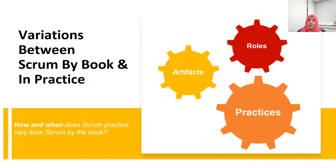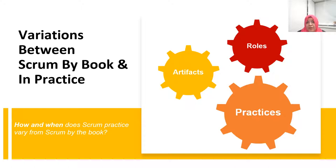While looking at how and when Scrum practice varies from Scrum by the Book, we found variation across three main categories: variations in Scrum roles, variations in Scrum artifacts, and variations in Scrum practices. Some examples of variations in Scrum roles include multiple teams sharing a product owner or a Scrum Master. We also found that teams were practicing Scrum without any Scrum Master, and it was also common that a team member was serving as Scrum Master on a rotational basis. While Scrum by the Book encourages cross-functional teams, our results confirm that it is not uncommon for a team of specialists to practice Scrum.